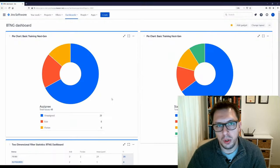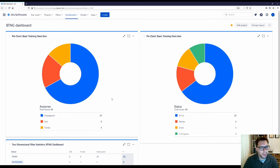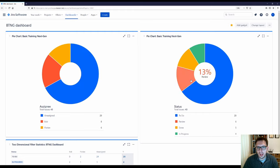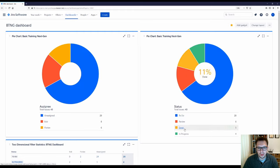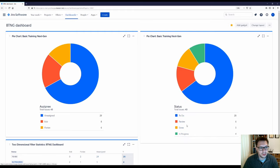So let's build and share a simple project dashboard. I quite like having a pie chart that shows what user is assigned to what, as well as a pie chart showing the distribution across all of the statuses. This allows me to see if there's a bottleneck in a particular status, as well as if there are any oversubscribed team members.